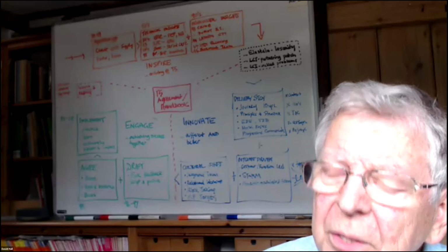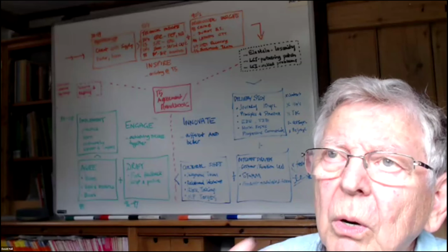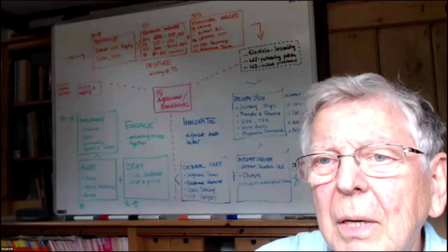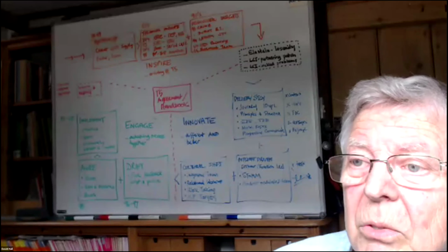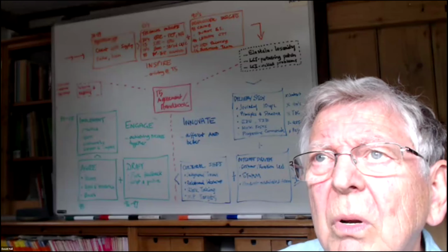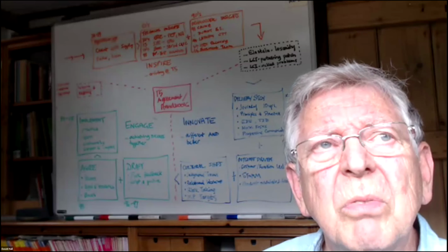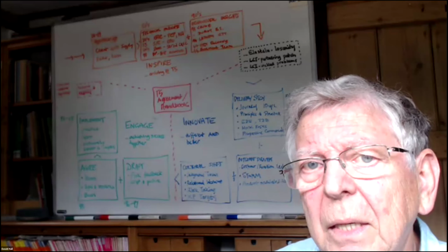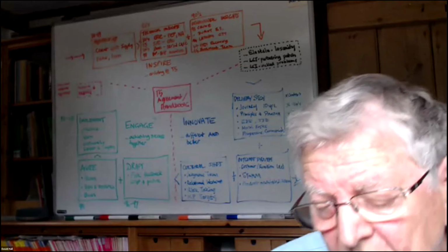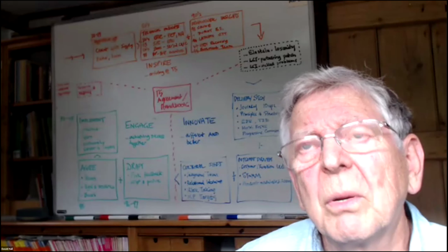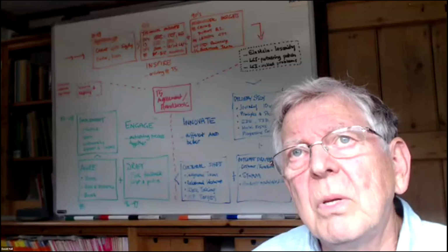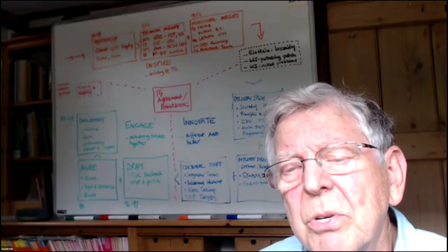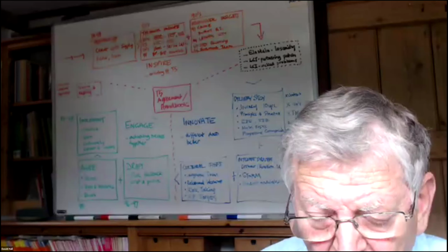So what we ended up with was, rather than writing terms and conditions, we rolled it back to principles and structure. Yeah. And that required a lot of discussion, a lot of forward looking, and a lot of input. One of the real values of heading up T5's procurement activity concurrently with the framework activity was that it was a good opportunity to get feedback and input from suppliers, as Simon's already referred to. And we set up quite a lot of forums to pull this learning and history from outside of standard UK construction, from petrochem and the motor industries and the like as well.